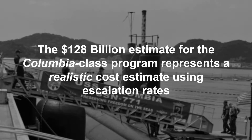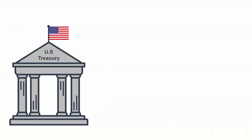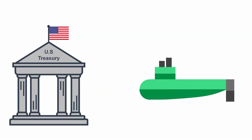For the Columbia class program, the $128 billion figure reflects a realistic cost estimate using the escalation rates of the various types of material, tooling, labor, and other cost components included in the program. The $128 billion figure represents the actual amount of dollars the government expects to spend on the Columbia class program over 35 years.